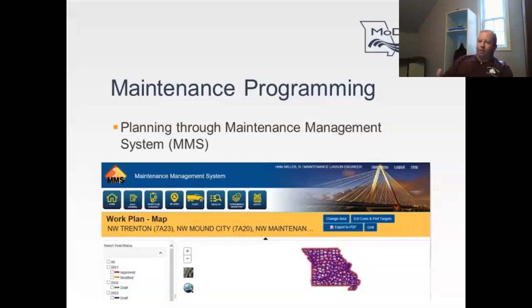And then finally, the third year, we ask that 40% of what you typically do, let's say, again, $100 million is a typical asphalt pavement repair, we ask that you have 40% identified in the third year or the third calendar year of the STIP. One thing about the operations section of the STIP, it is a little different than the rest of the STIP. We do perform our work more or less in a calendar year environment. So it is communicated that way.